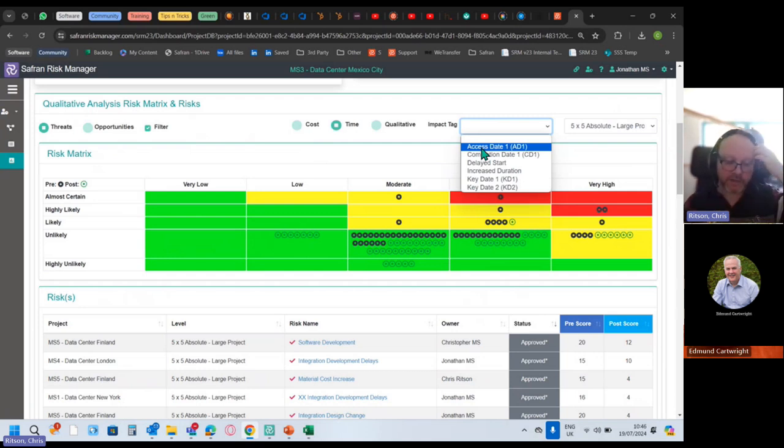Because when you look at ISO 31000 and all these other sort of definitions that we use in risk management, if you don't have an objective that's at risk, then you don't have risk. So it's not that the project is at risk, it's the constituent parts of what the project represents that are the value propositions of the project.